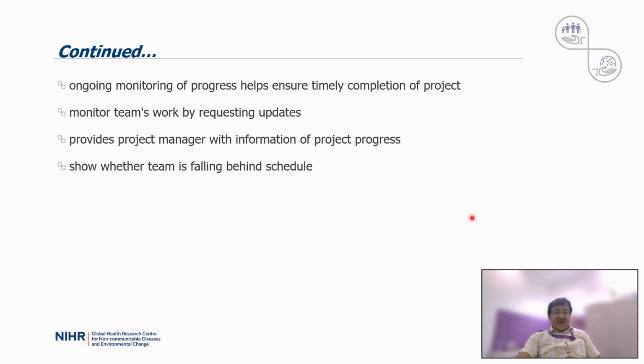First, it provides the project manager with the information required in the regular reporting of project progress to PIs and key stakeholders. Second, it can reveal whether the team is falling behind schedule, allowing the manager to make adjustments such as adding additional resources or adjusting the timelines.